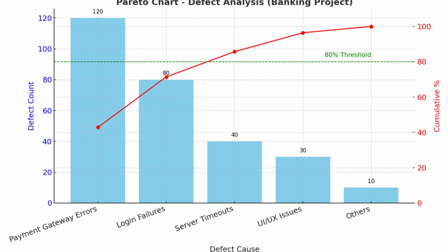It's a commonly used histogram. It arranges results from most frequent to least frequent. This is to identify which root cause contributes to most problems. Addressing the root cause of most frequent problems will definitely create a great impact on quality. How is this tool going to help in solving problems in project management?